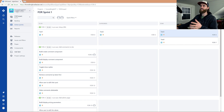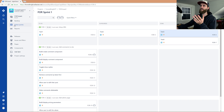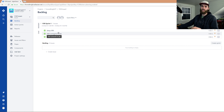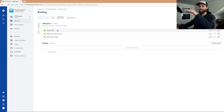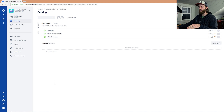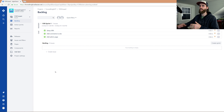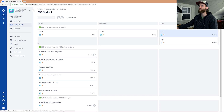You have your software project — the whole entire application — and then you break those down into stories, which is what you have right here. You log all of those issues into the backlog — that could be features, bugs, support, whatever. You document everything into the backlog, and then when you're ready for your sprint planning, you drag up whatever issues need to be addressed over the next three weeks if it's a three-week sprint, and those come over to active sprints.